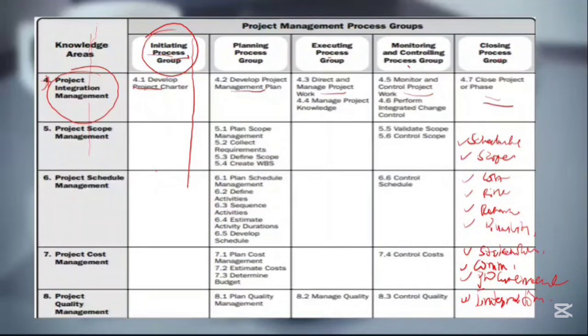And that takes you to planning. So you take your time and plan your cost well. They are telling you in the charter, summary, duration, high level, we want to use 4 years to do this job. Stated in there, it's your job to take your time to go through the activities to check whether the duration stated in the charter will be enough. If not, you go back to them. So you will be doing the detailed work, but they will give you a high level information, and that is the charter.